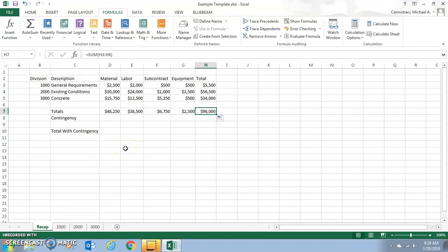So contingencies are a percentage you can put on an estimate for unknowns. You can put that on the total. Maybe you're not sure what kind of equipment you're going to need. Maybe there's a pending labor price increase. Maybe there's something wild going on with material. A few years ago, there were really big spikes in steel pricing. There was a lot of construction going on with China. They were buying up all the scrap they were producing here. When there's a lot of construction going on, it boosts the material prices.